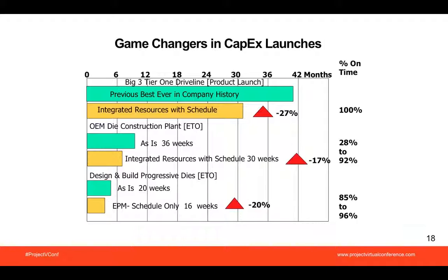The capacity forecast was not available to this company because they required a project scheduling system for one large project that's described here be put together. And so we didn't have capacity of all the smaller projects because we didn't want to take as much time as it would take to do all the projects. So at the end of every month, there was a forecast of all the different departments and how much effort it was going to take. And every department manager, from product engineering to manufacturing engineering to the plant, had to state how much of this project effort in man hours could not be done by their resources and their area of responsibility. And then it was up to upper management to prioritize that in a meaningful way to keep the project on track.